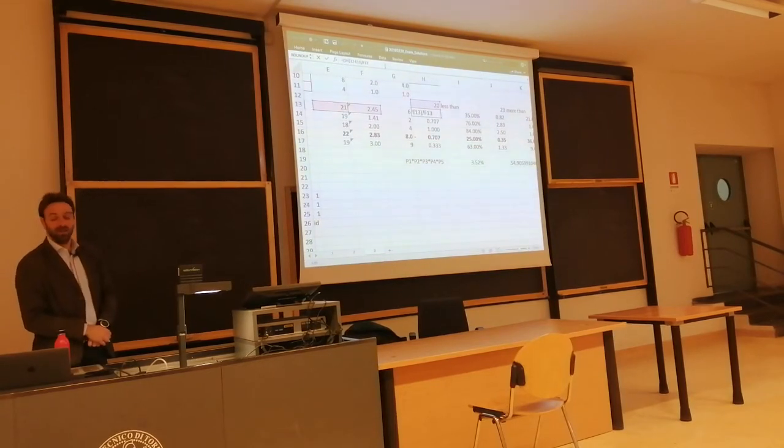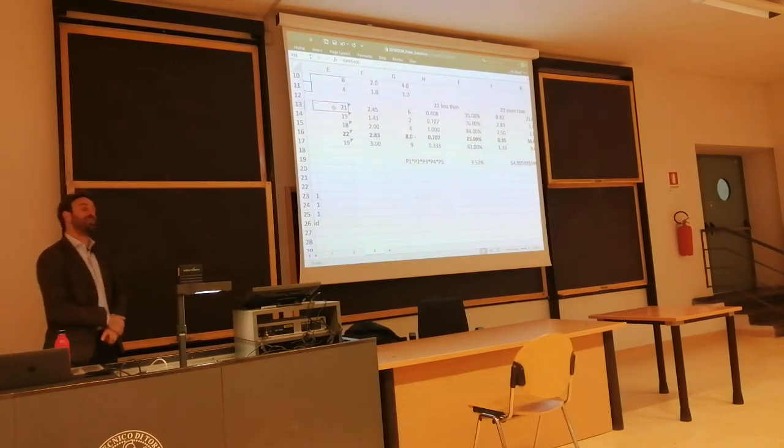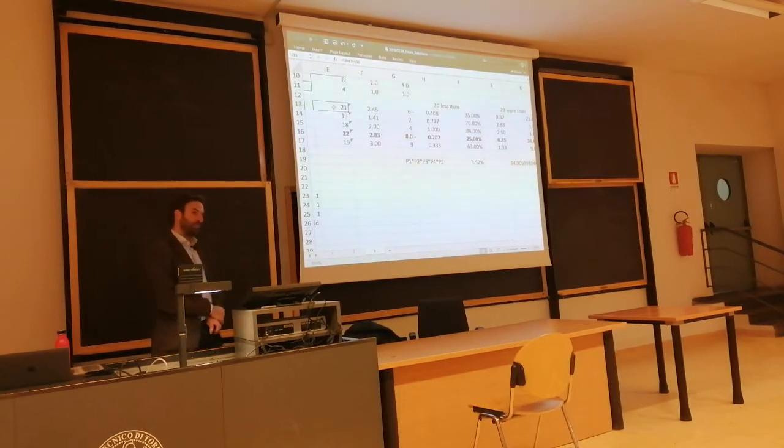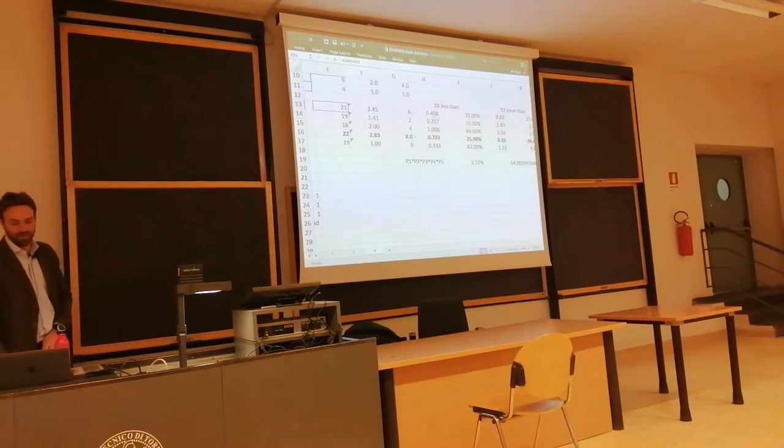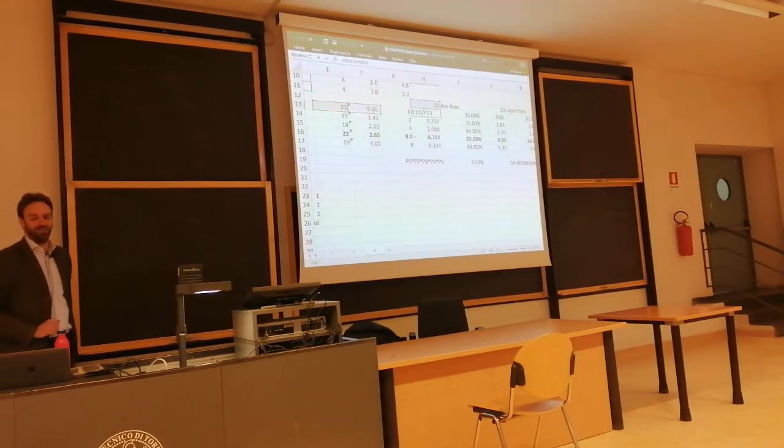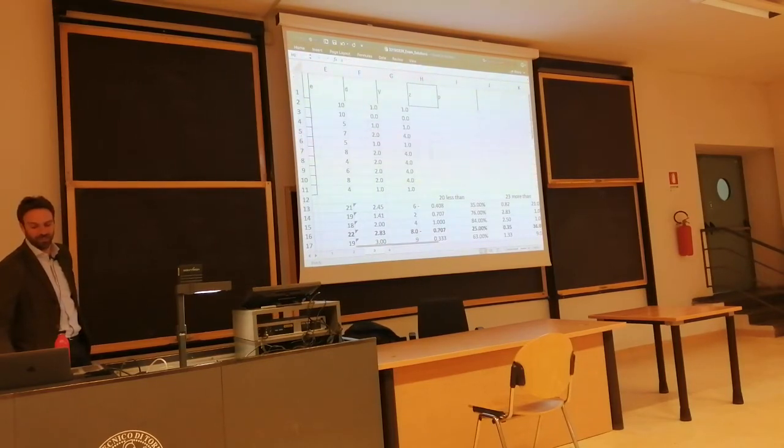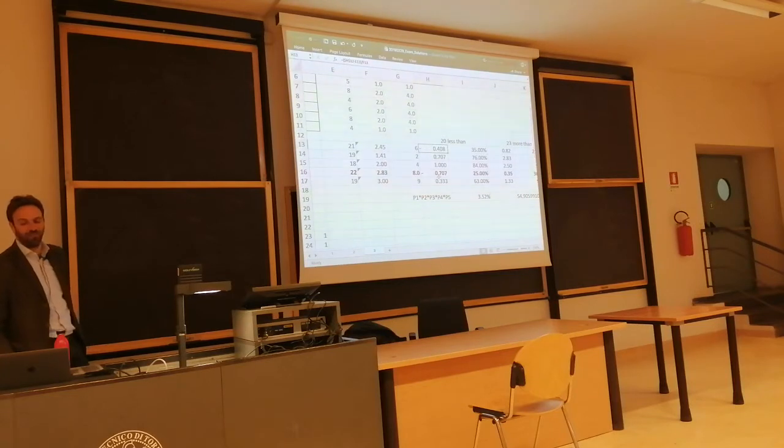And you know the formula because 20 is the desired duration, 21 is the expected duration. So it's 21 minus 20. It goes to 20, the desired duration, less the expected duration, divided by the standard deviation. And you get the z value, which is negative 0.4.